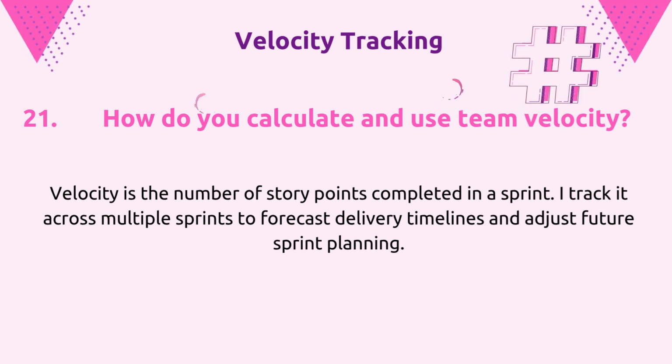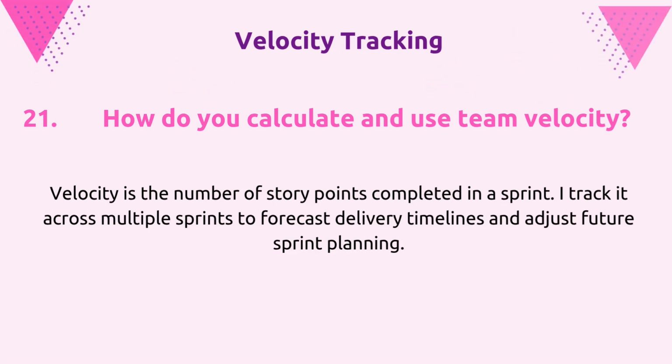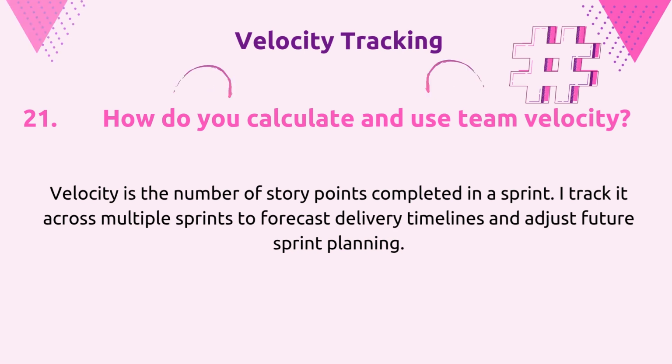Question 21 related to velocity tracking. How do you calculate and use team velocity? Velocity is the number of story points completed in a sprint. I track it across multiple sprints to forecast delivery timelines and adjust future sprint planning.